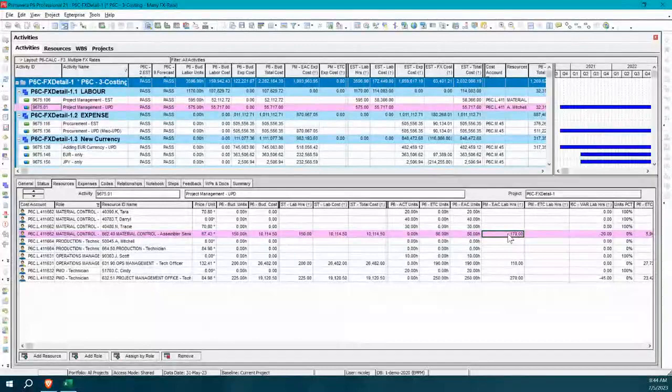So that's where our CAPS tool could come into play. You could do it in a meeting with them. There's lots of different ways to gather the at completion. Now, in this example, the at completion that the PM gave us was 170. So they're actually expecting this to take more hours than the 150 that we had originally estimated.